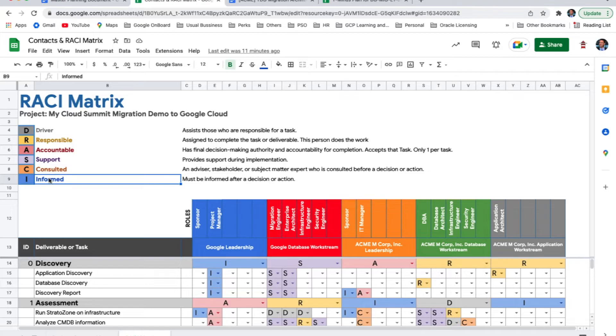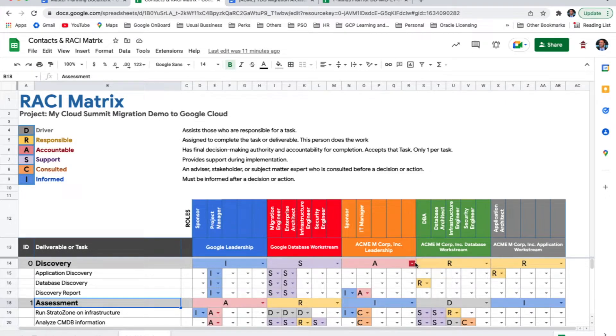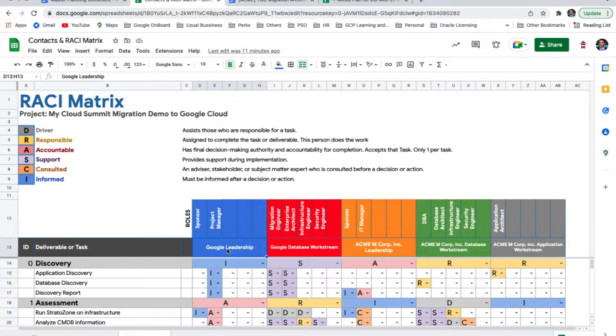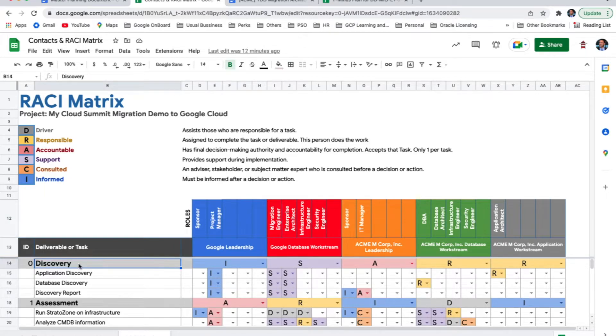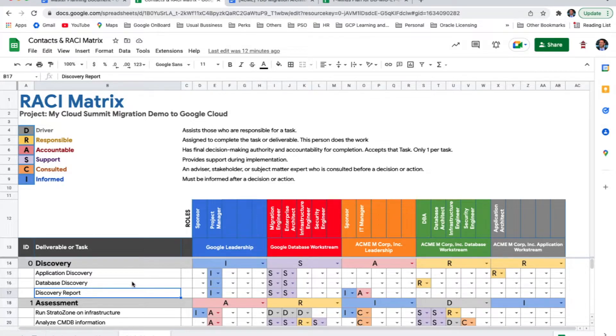The next section, RACI metrics. It helps you to understand who is responsible, accountable, must be consulted, or must be informed for each process of your project. Now, if you see here, every one of our major processes, they do have that definition. Who is responsible for discovery? You get to see here. And if you see a little bit above, you get to see all the work streams that we discussed before in our project contact list. You can also include people's names or titles in those boxes. So let's get deeper in this RACI. Not only we get to see the process level, but we get to see a task level within the project. Now we understand very clear who is responsible for doing each task of the project. So there is no confusion. This is a great communication tool for your project as well.